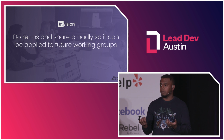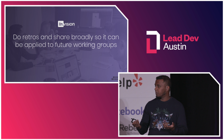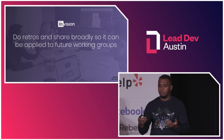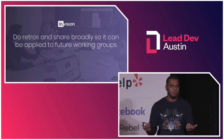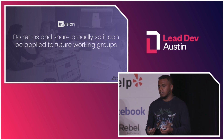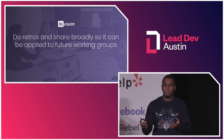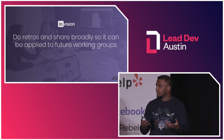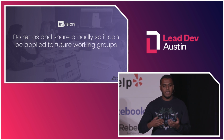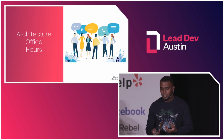One of the things we learned is when you have 15 volunteers in a group, not everybody was able to allocate the same time, which both slowed down the project and also lowered the morale of that group because they felt like everybody wasn't pulling their weight. So for the events working group, even though we had an interest group of 15-ish people, we had a more focused core group within that we knew could actually make the time to do the work, and that showed uptake in terms of their delivery and also the morale of the group.